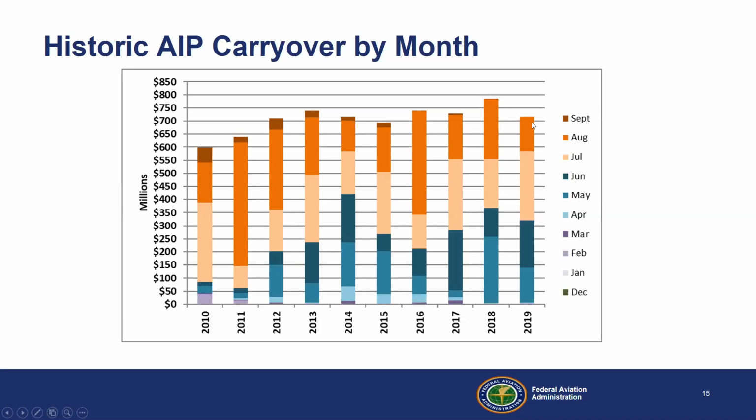If we're still doing carryover in August and September, none of that money can be put under grant in a time that you can actually work on a project. So the entitlement carryover gets converted into filling up the bucket of discretionary. So it gets magically, unicorn sprinkles, turned from entitlement to discretionary.